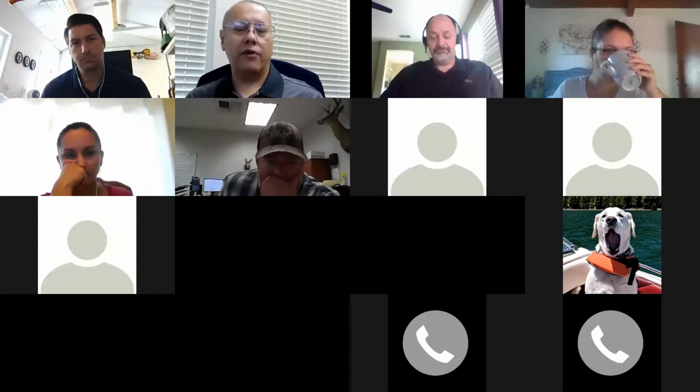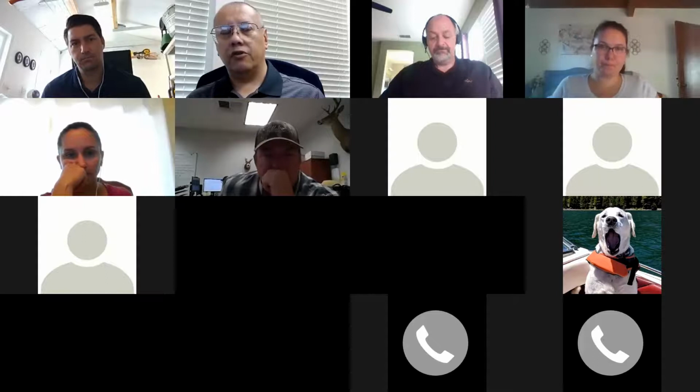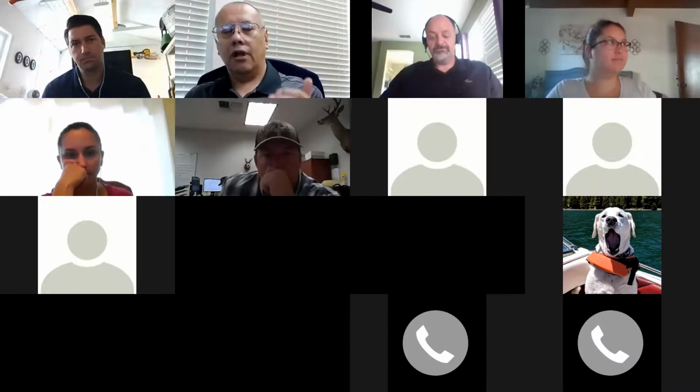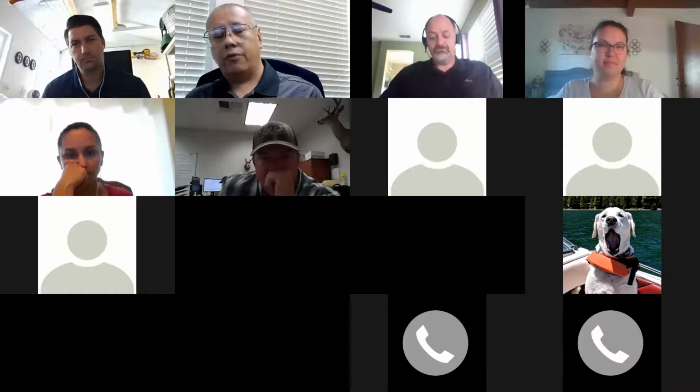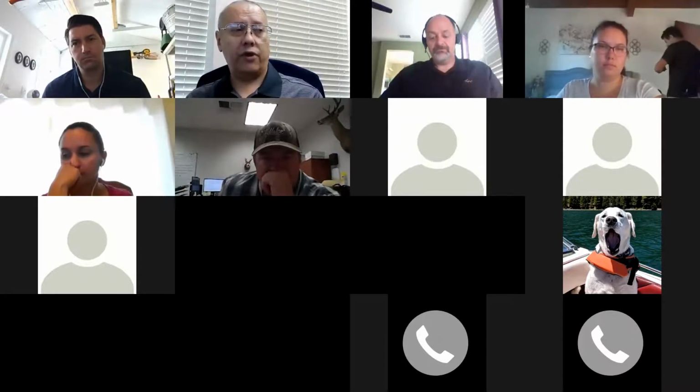But you also want to have a cross. I mean, different organizations do it a different way. Typically what we've done with construction, the most recent, but again, it's one of those things that you start at the top. To do the top level 1 and level 2 and level 3, you probably want anywhere between 6 to 8 people, not exceed 10, cross-functional.